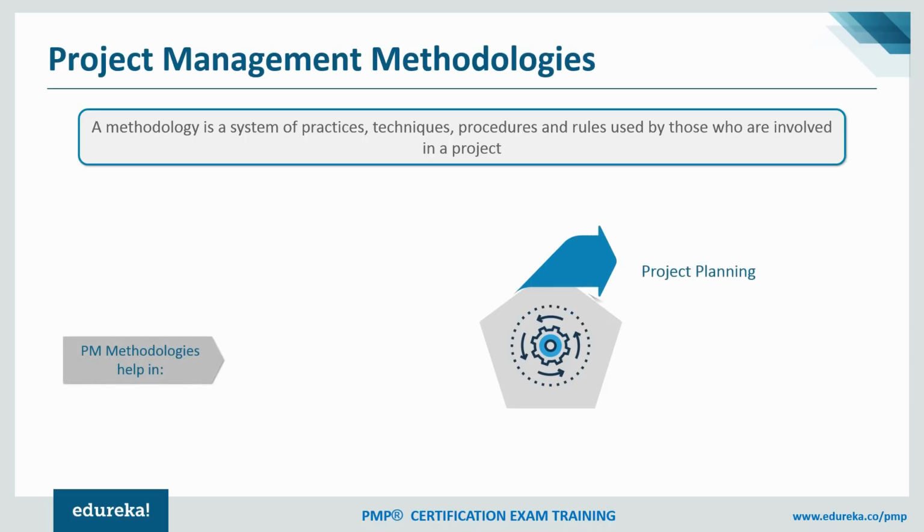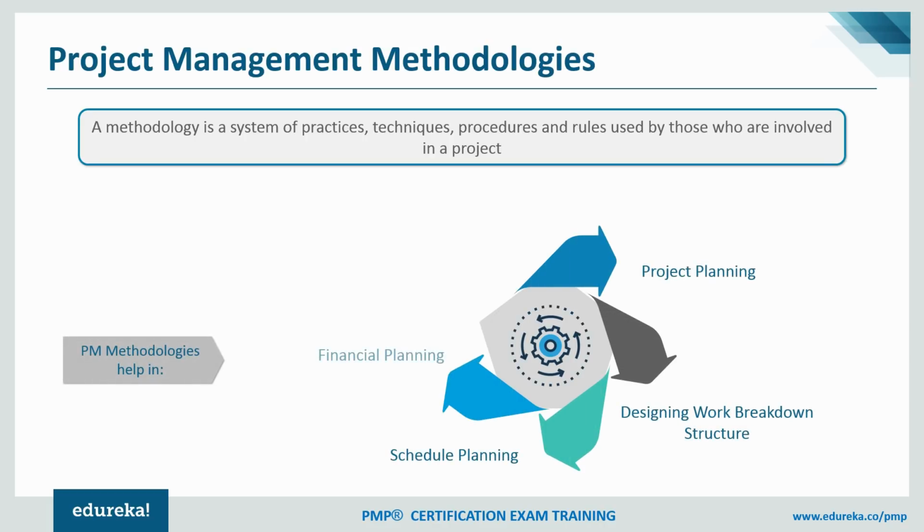Let's talk about some of the benefits of the project management methodologies. Certainly, one of the benefits is about work authorization. You may be using certain tools currently while working on a project, maybe MS Project, or for that matter, Workbench is another one, or there is a tool by CA by the name Clarity. So some of these tools are really useful in creating the work authorization systems. Once we identify the project scope, then we break down that scope into activities and tasks, and then we assign those tasks to different employees or associates. And that's how we get into the work authorization process.